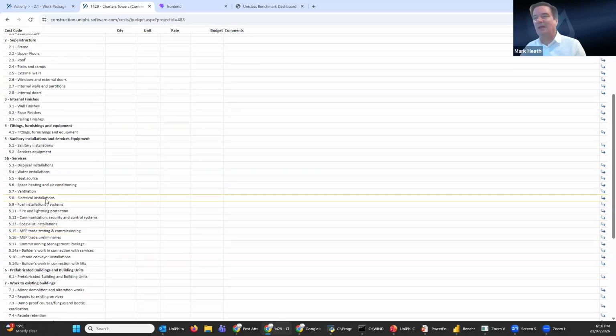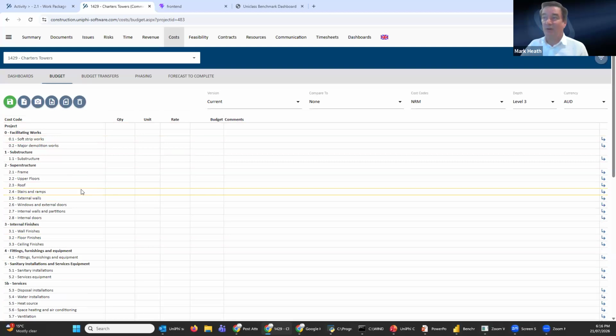So again, the element with comments and with contracts that are led against these, well, they'll be led against the trades, but mapping those trades back to the work that they're doing, we can then reapportion that through the contracts module back into the superstructure elemental system. So in that transformation, you'll get both a trades-based breakdown and an elemental breakdown to your standard for both the attended price and the as-built, but you'll also have all of the estimates over time that were directly imported to the elemental standard, standardized into this transformation load. So that's the next phase of development to make that happen.